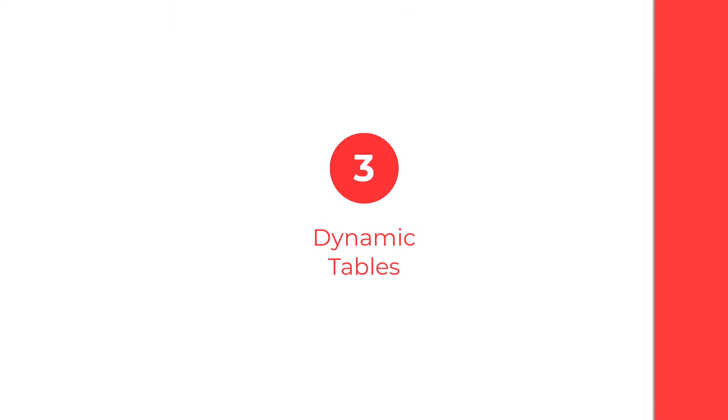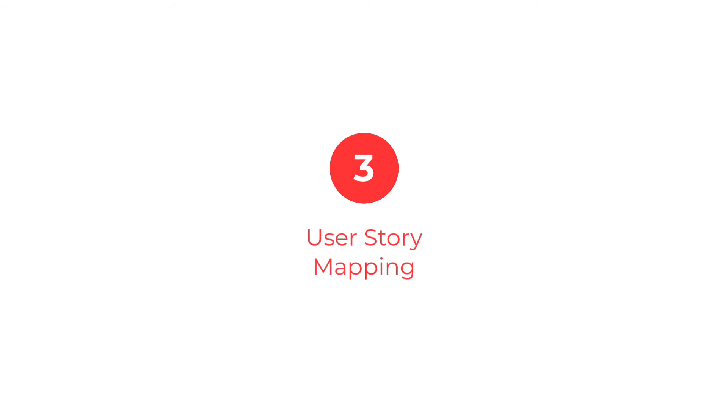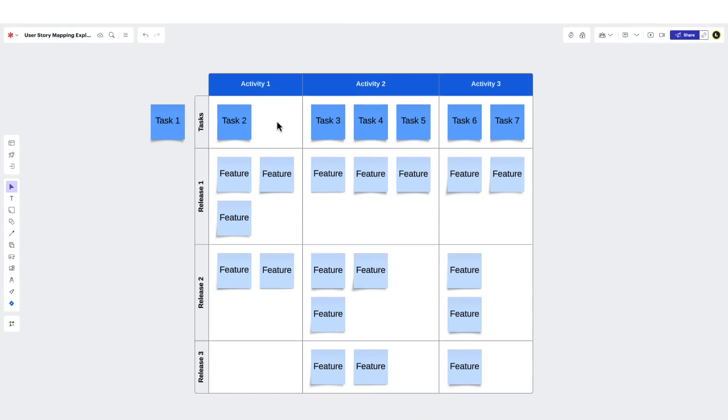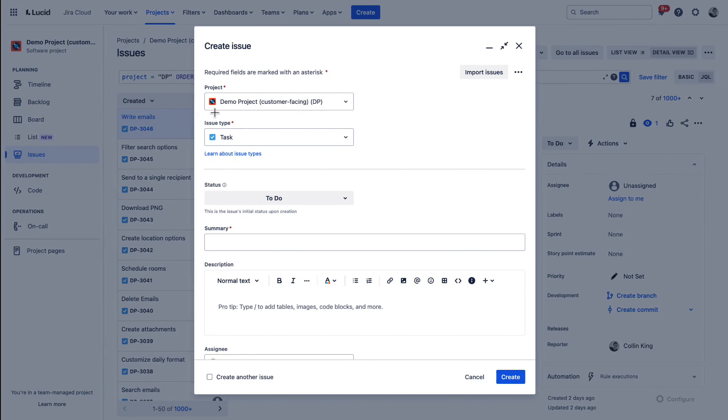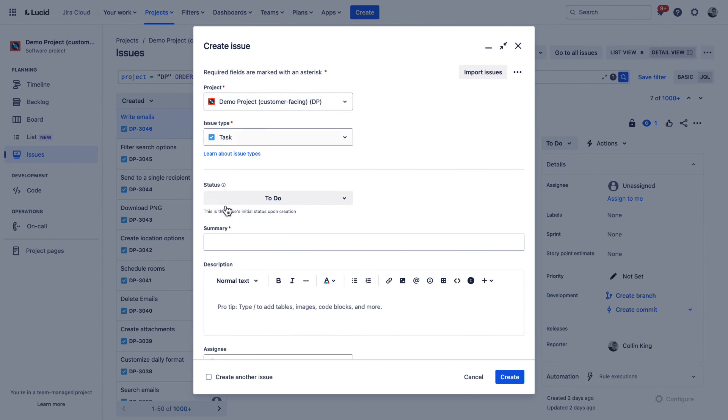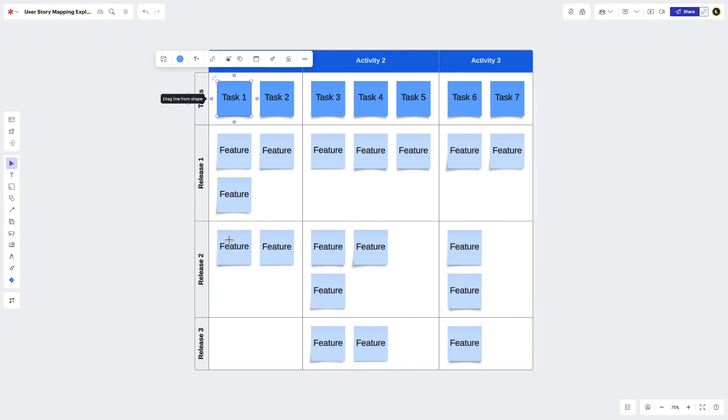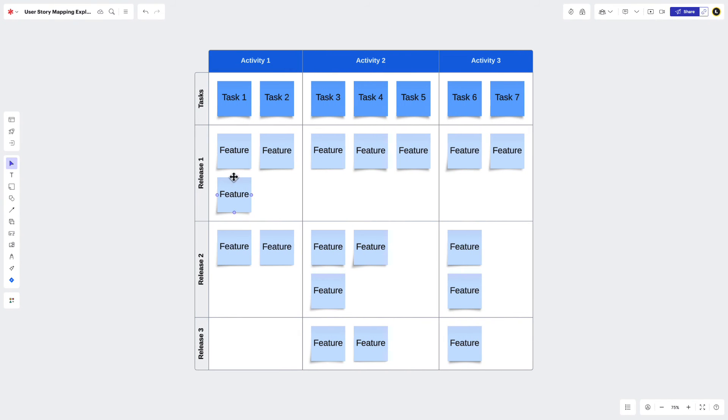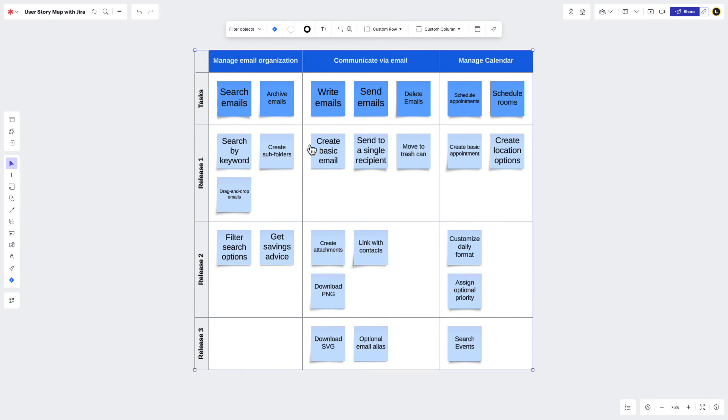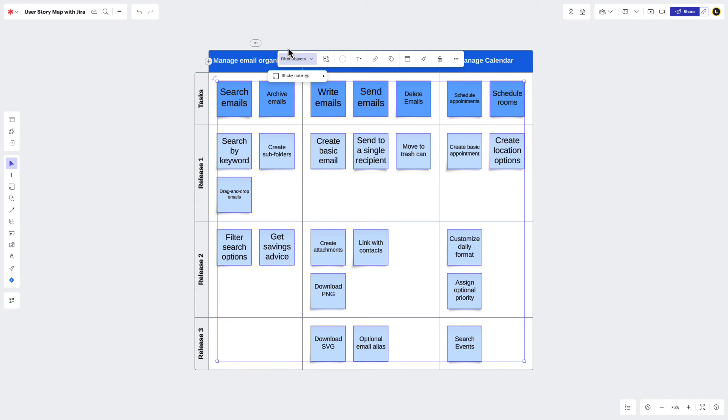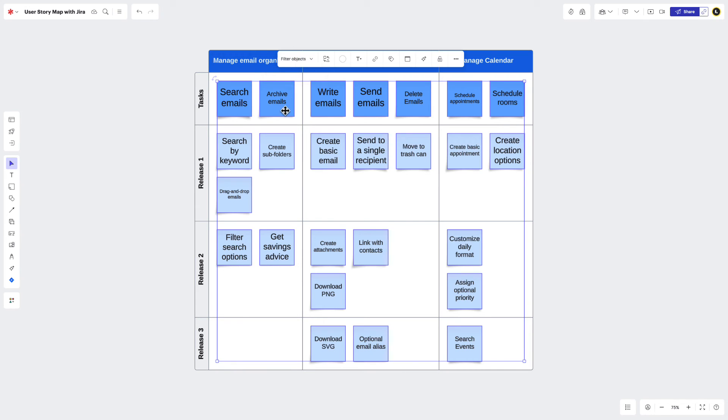Next up is User Story Mapping. A lot of teams use Lucid to map out user stories and activities, but then switch to a product management software to turn those ideas into tasks. With Lucid Cards for Jira, you can streamline your workflow by converting ideas to Jira issues from right inside LucidSpark. To do this, select the sticky note or shape you'd like to convert, right-click, and choose Convert to Card, Jira Issue.